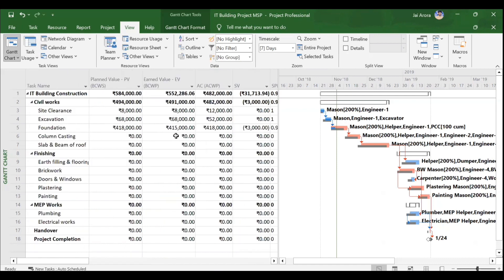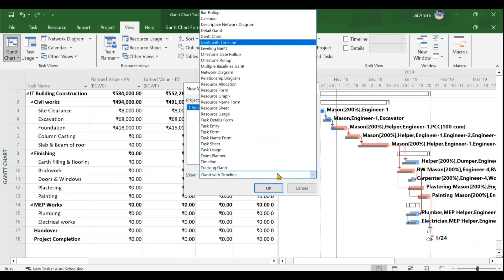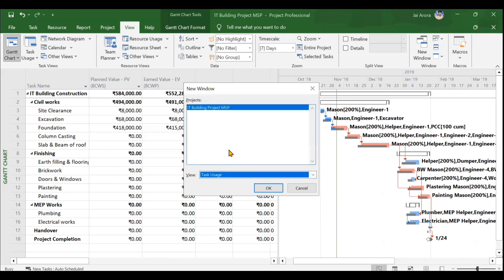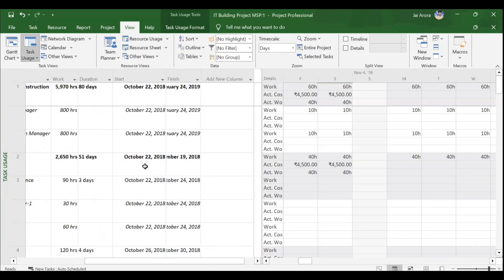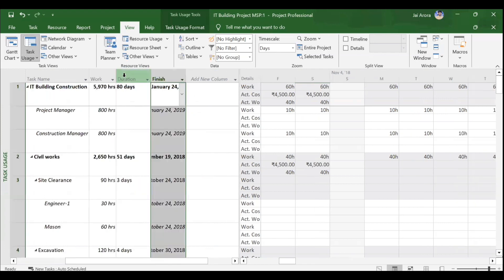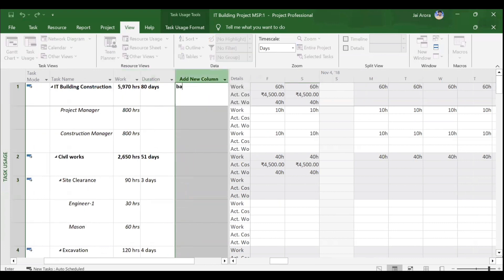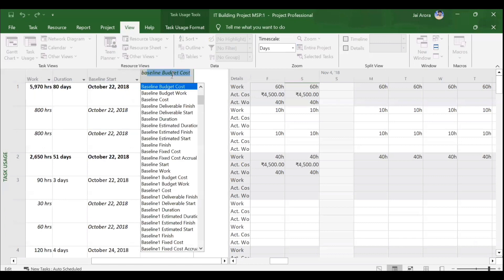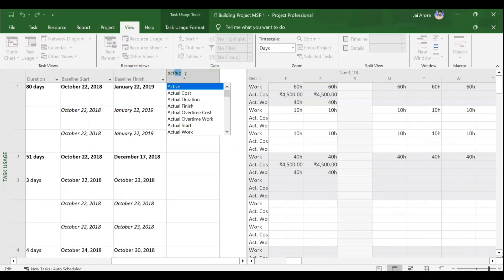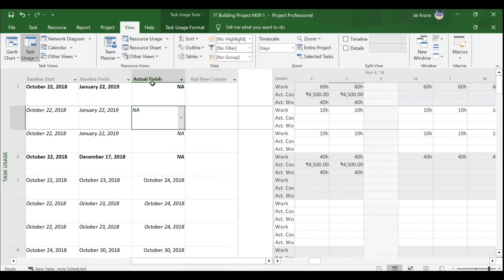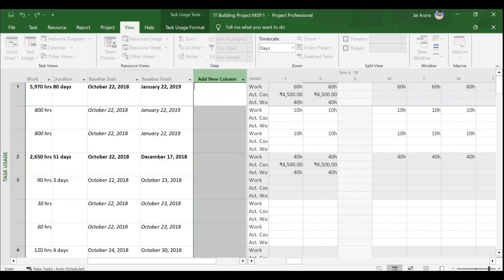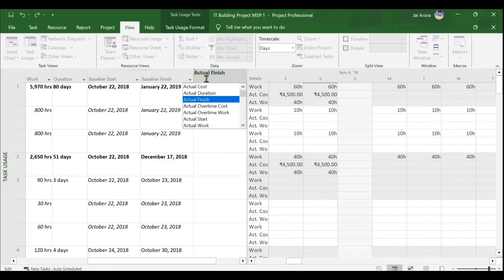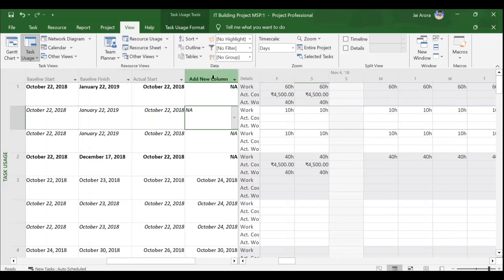One more thing required is the Task Usage form displayed alongside. MS Project allows two windows at once via the View tab. Go to the Windows section and click 'New Window,' then select Task Usage form and click OK. In the Task Usage form, delete the Start and Finish columns and add Baseline Start, Baseline Finish, Actual Start, and Actual Finish columns instead.